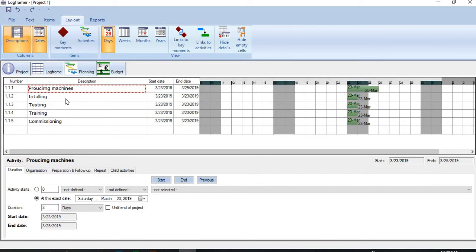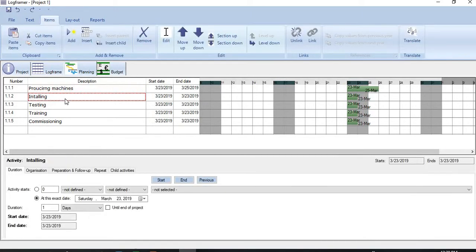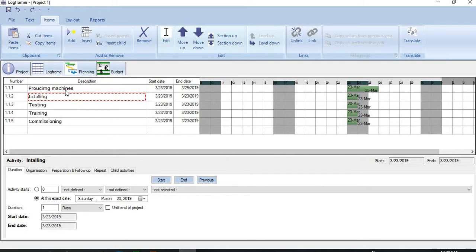In the second step, we need to establish linkages among these activities. Installation will come only after procurement. So I need to establish a linkage, a finish-to-start, what we call FS relationship here. And how to establish this relationship? There are two ways.